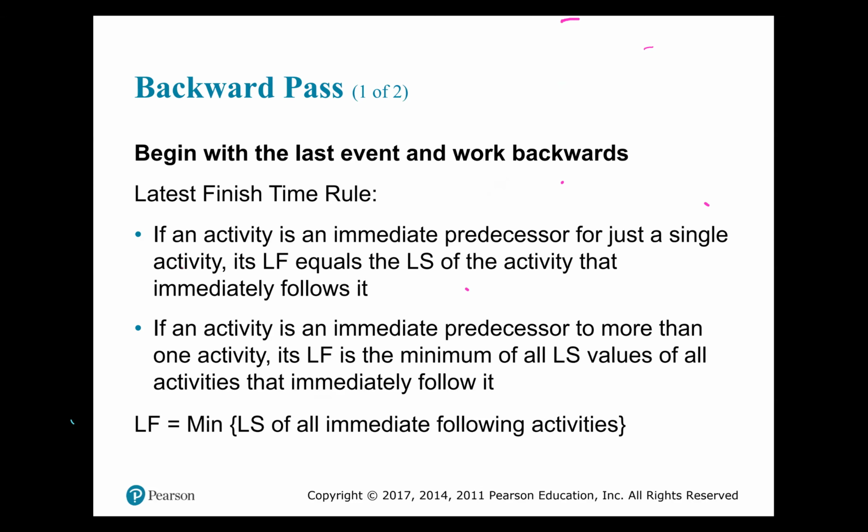So on the backward pass, we must do our calculations for the lates. We're going to begin with the last event. The last event was the finish node.